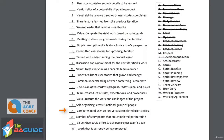Compares total user stories versus completed user stories — this is a burn-up chart. The biggest difference here is you're comparing completed stories versus those total stories. Because that total could always change and continue to rise or fall, the burn-up chart does a better job than the burndown chart of giving us a picture of where we're actually at versus the work that needs to be completed.